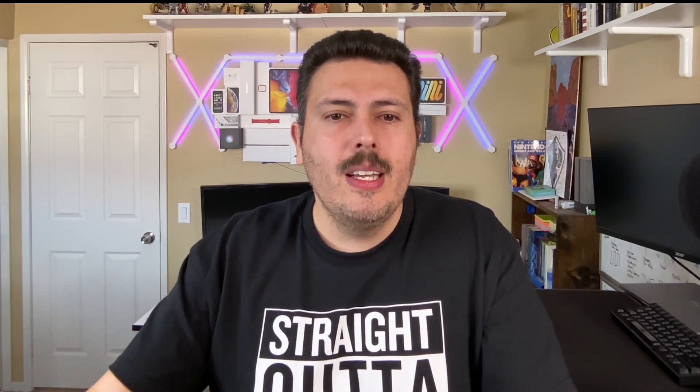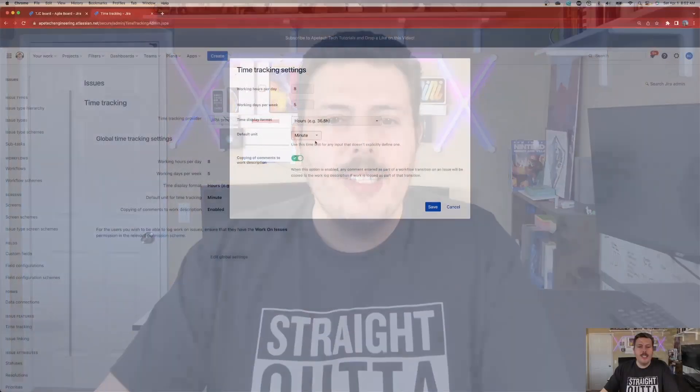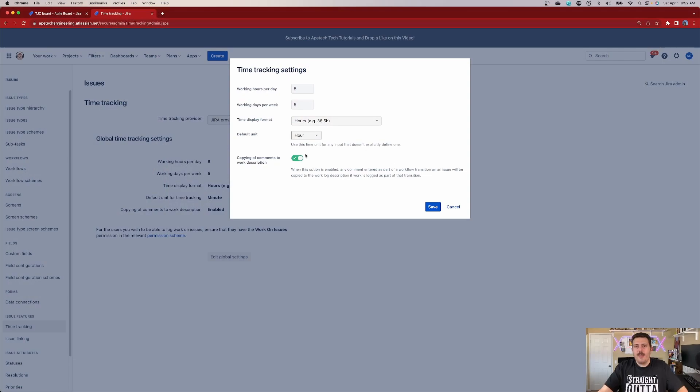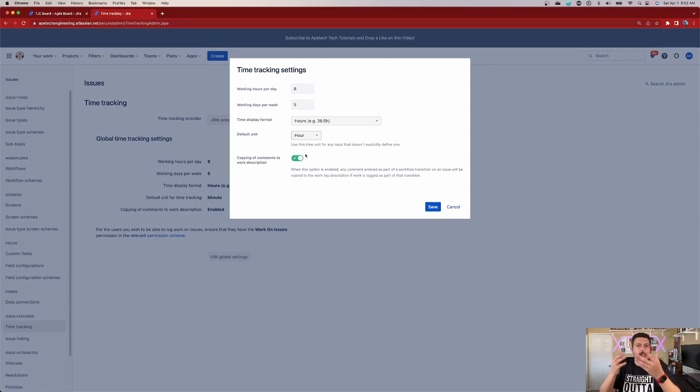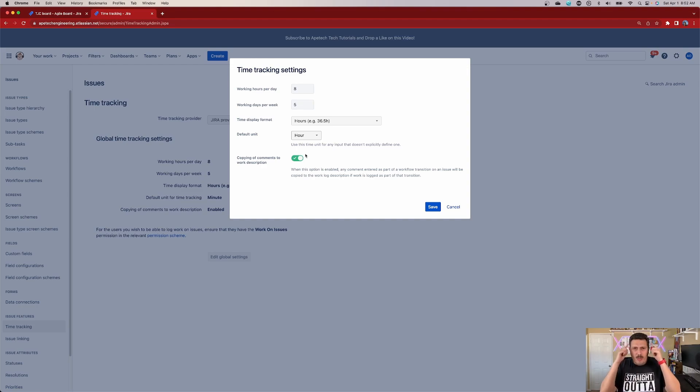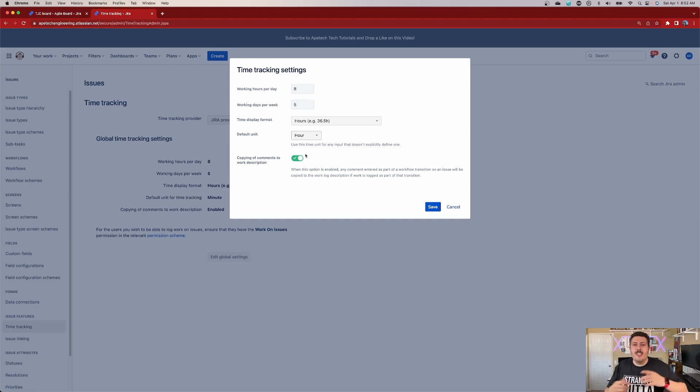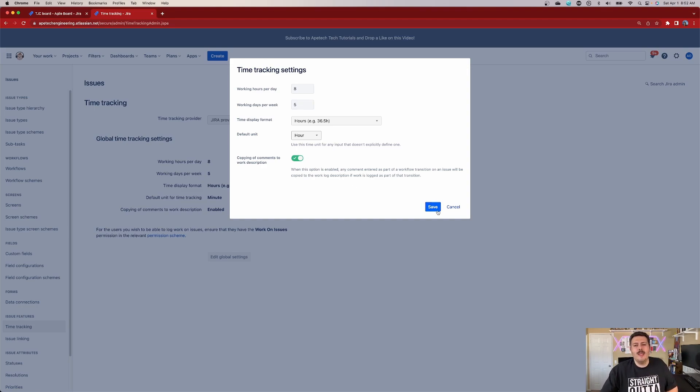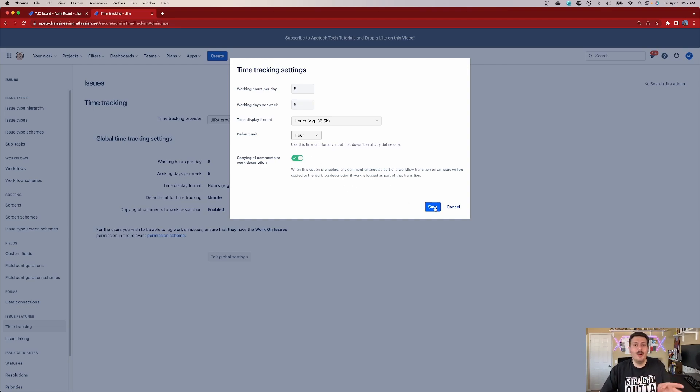So if your team primarily works in hours, I would get this changed so that it's always hours. That way you minimize the mistakes. That way, if somebody is intentionally just working five minutes on something, they will be very intentional with putting 5M instead of just leaving a five. But yeah, this is something you definitely want to communicate with your team and make sure that everybody's following a common pattern here.